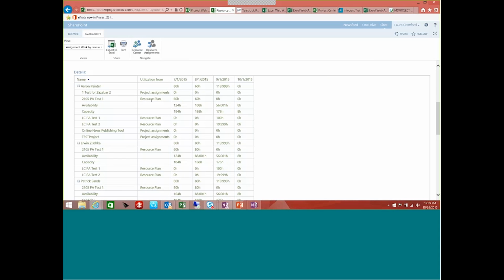The idea is that I can say, I need 2 developers, I need a project manager, and I need an analyst. And I need them for 60 hours in July, 60 hours in August, and then I'm done for this particular project. All right, of course, your projects will be more lengthy, so maybe you're planning your resource needs over the course of 6 months.